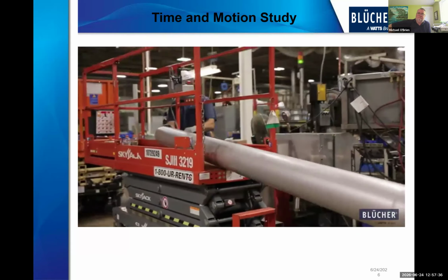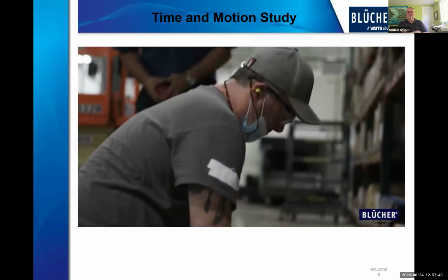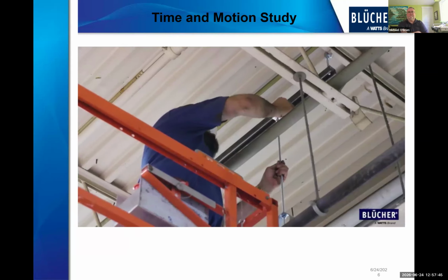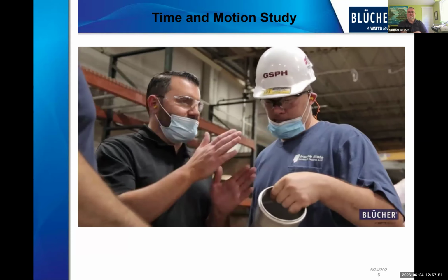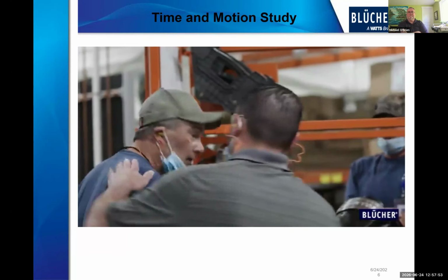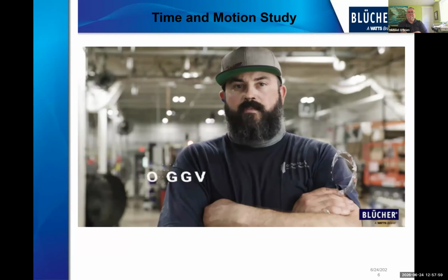So that's where we come in, where we need to make sure that everything is the same for each product installation. It's non-negotiable. We need the same exact installation crew, the same exact layout, the most up-to-date manufacturer's installation instructions, and we direct the crew to base their installation on those manufacturer's instructions, and then we let the data speak for itself. That's what's most important to us.